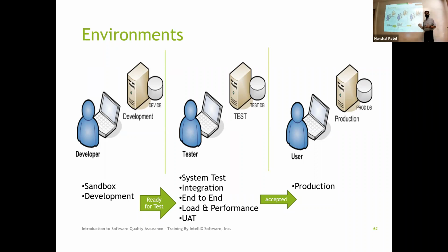Now, if I'm a small company, a startup company, I'm not going to have the money and budget to run all this in different environments. Right? So I can just say, hey, my system and integration test environments are the same one. Or I'm going to use the same environment to do all these 5 things, but I'm going to time slice. Right? So the first 4 hours, it's going to be used for this. In the night, it's going to be used for this. Right? And while the users are available, they can use it. So you can have multiple test environments to do different tasks, or you can have one test environment and time slice to perform the different tasks.